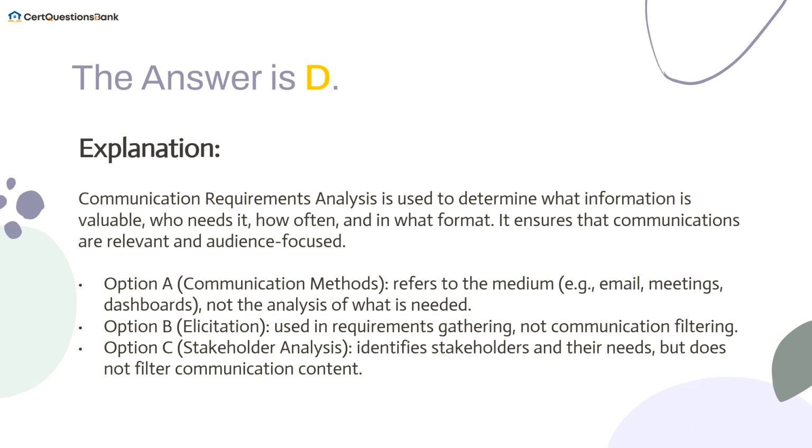The answer is D. Communication requirements analysis is used to determine what information is valuable, who needs it, how often, and in what format. It ensures that communications are relevant and audience-focused.